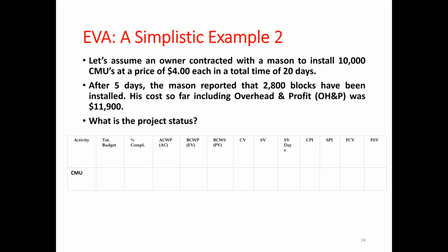Let's take example number 2. It's a very simple example to make an earned value analysis. Let's assume an owner contracted with a mason to install 10,000 concrete masonry units at a price of $4 each in a total time of 20 days.